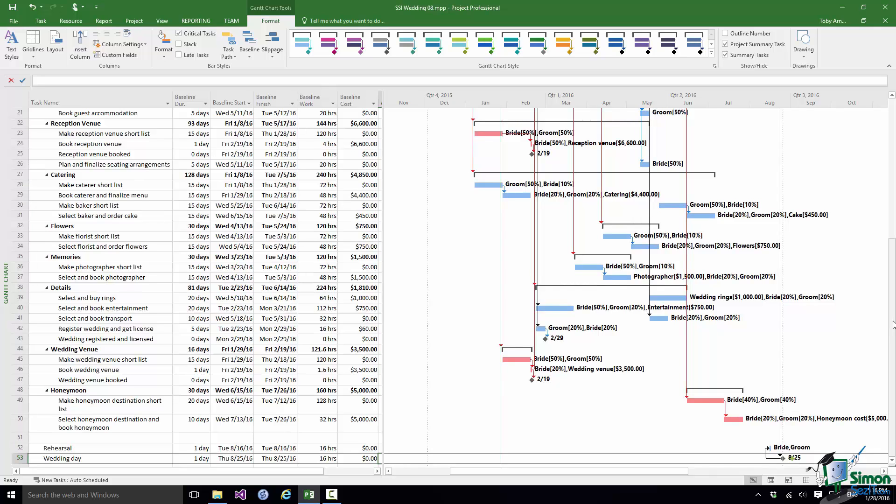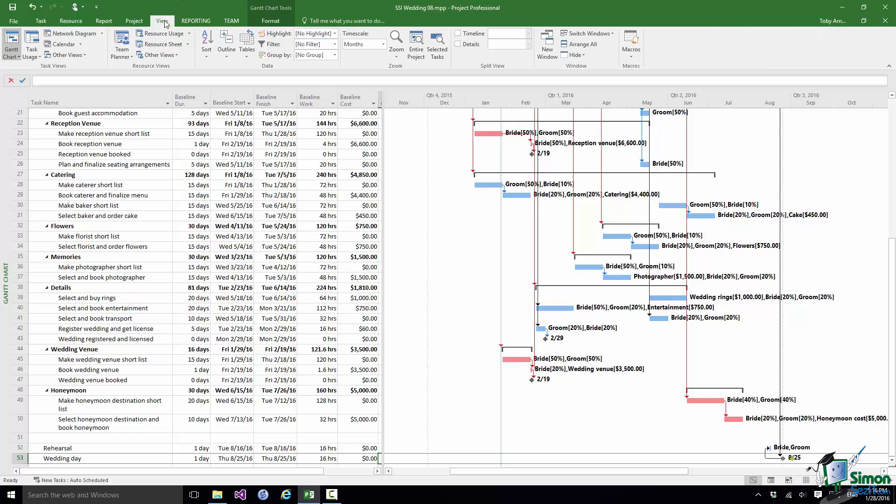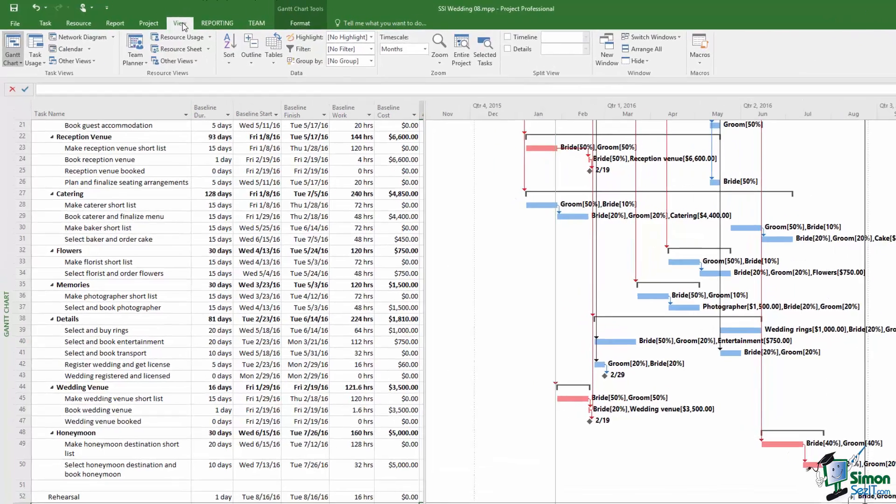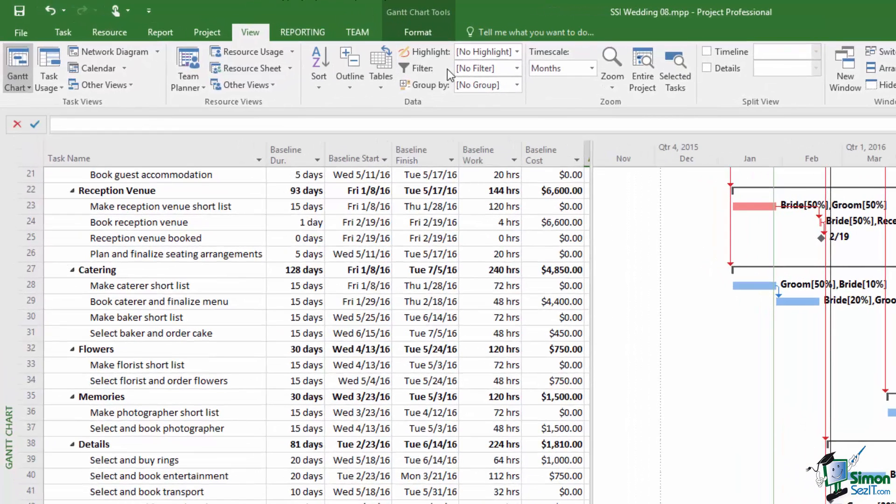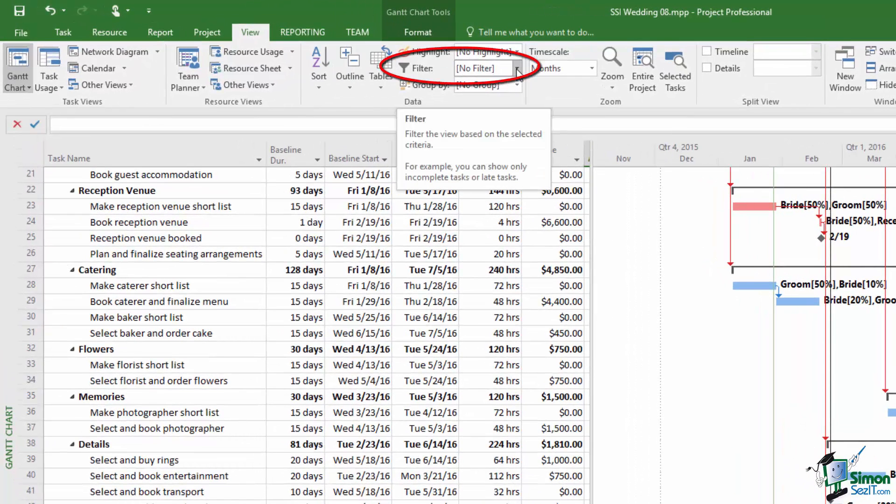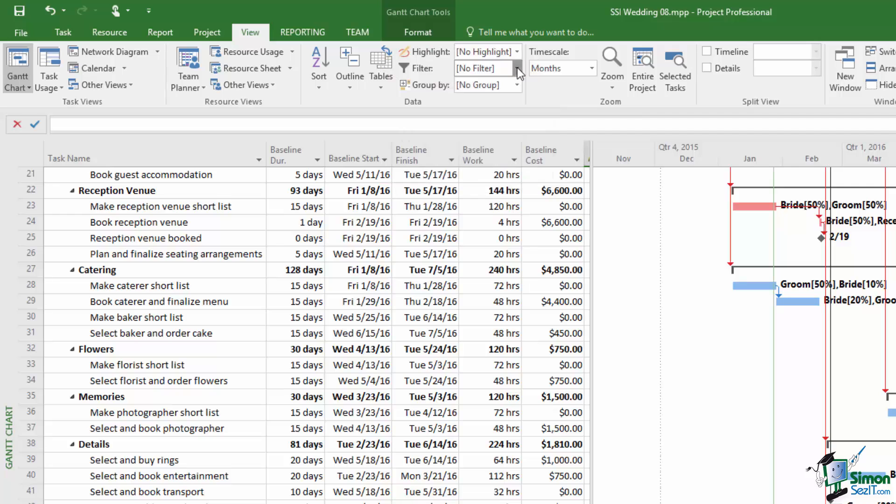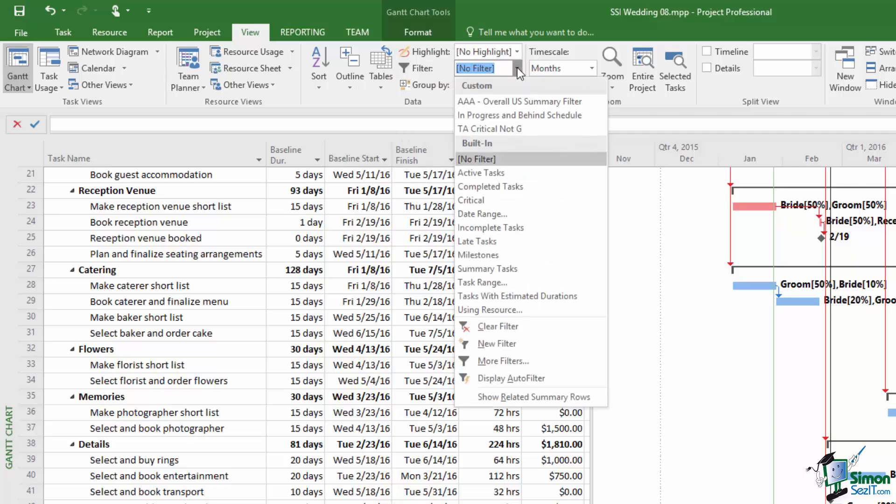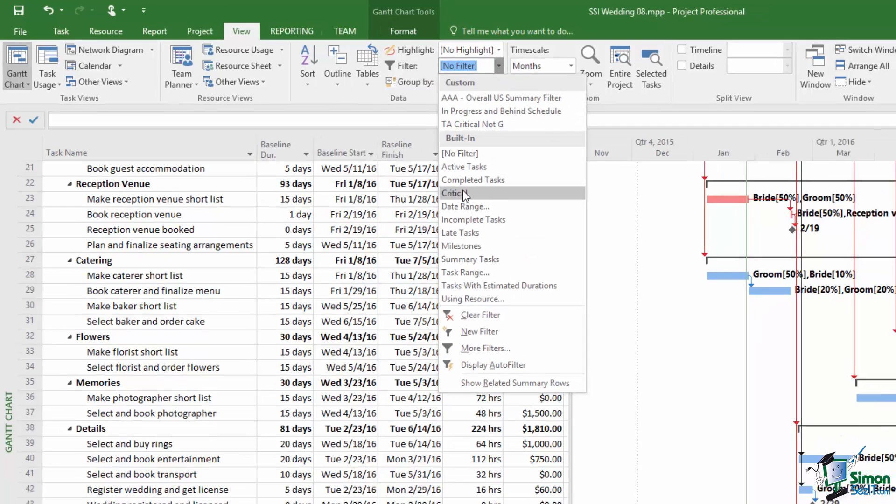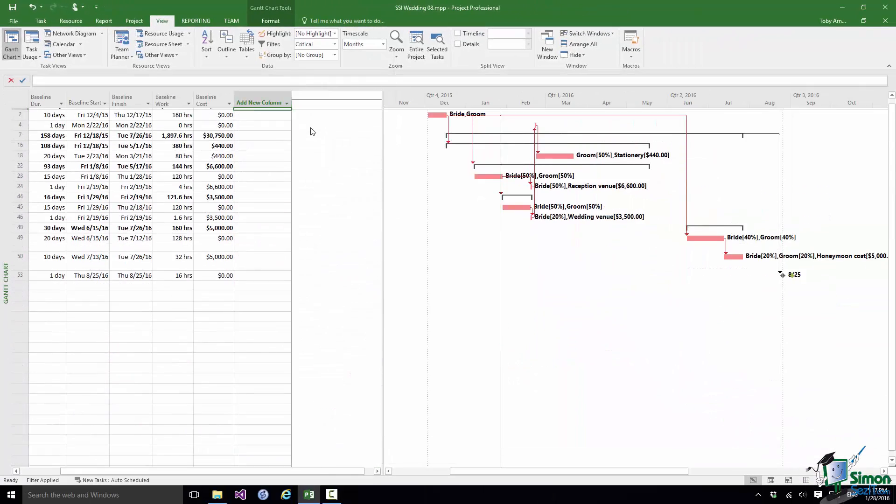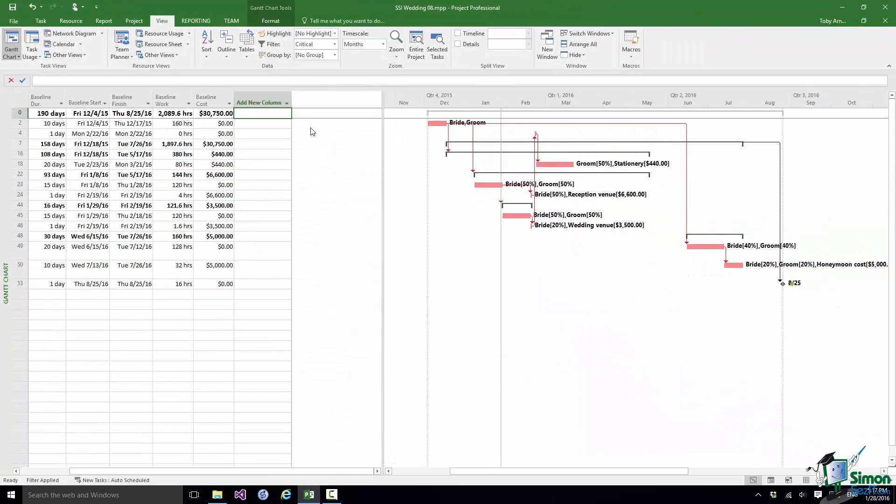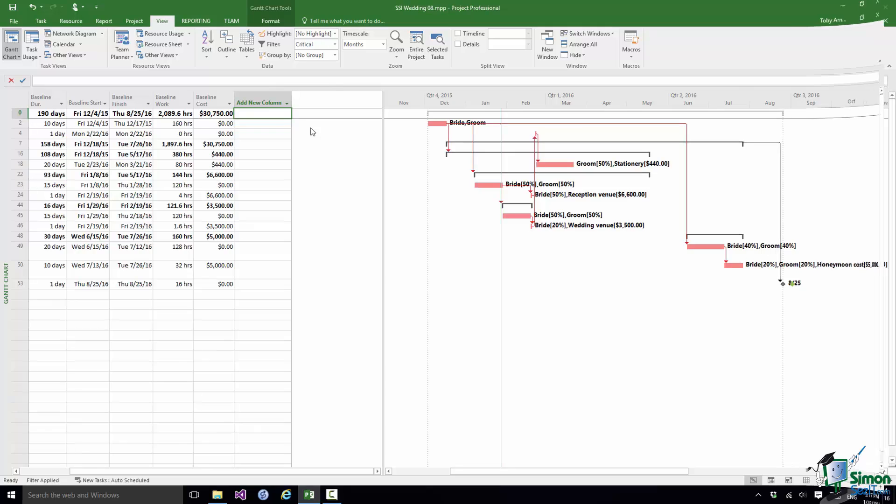Now sometimes, and particularly with a project with a lot of tasks in it, it's difficult to see the critical tasks. They may be spread out quite a bit as are these. And there is a way of only showing the critical tasks. In order to do that we're going to look at another important aspect of Views. So now I'm going to click on the View tab and I'm going to apply a filter. In this case the filter I'm going to apply, note the control there with the little picture of the chemical filter there, is Critical Tasks. So the filter is called Critical. And now I only see the critical tasks in my project.